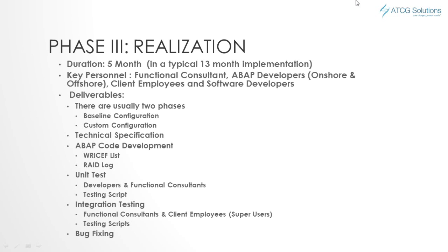Integration testing: a functional consultant will work with the client employees. When I say super users, they're usually the SMEs, the same people who gave you the functional specs. They will go through the test script and get signed off. During this period, there's also bug fixing. Of course, you'll find issues during unit tests and integration testing. It is best practice to get your bugs fixed within 48 hours, or else it should be in phase 2 or should be a CR, change request.